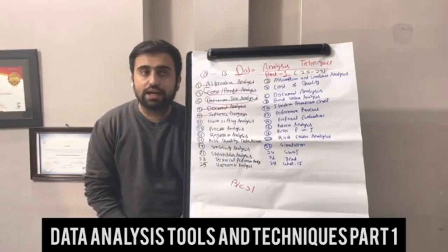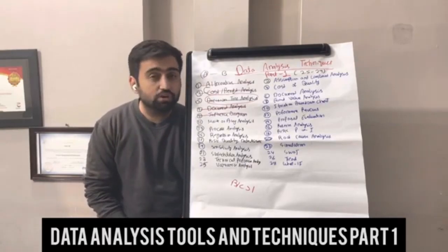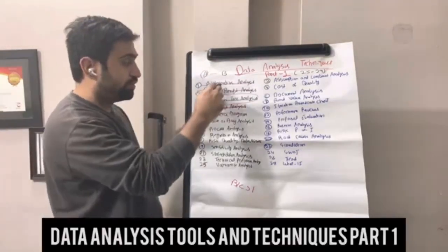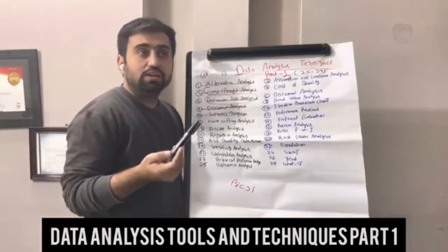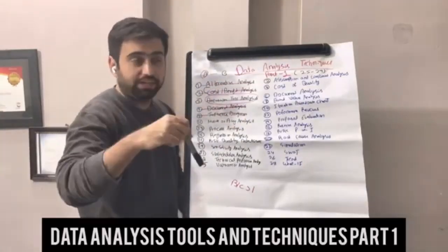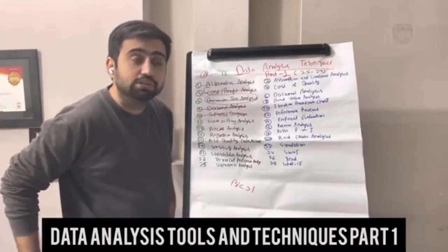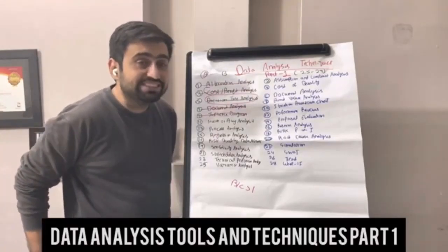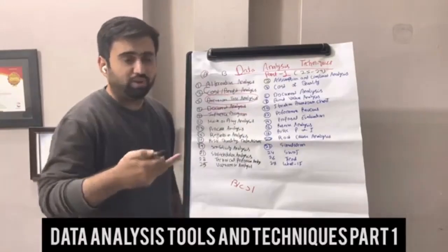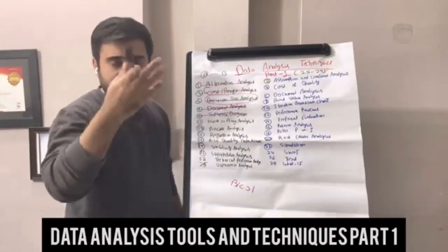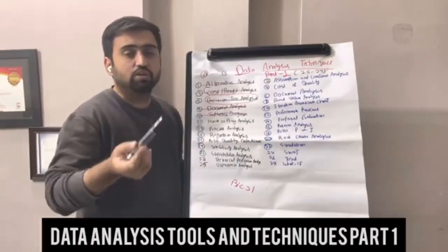A few of those things are whether it will be cost effective, again going back to the cost benefit analysis. Can we even make the quality that is available outside? Do we even have the skills? Do we even have the time? Or do we even want to make it? So in make or buy analysis, we consider all these factors.